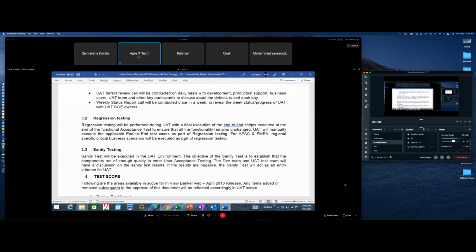Or we can do a certain percentage. What percentage will that be? According to the time remaining, it will be a third of them, right? But you need to identify which 2,000 test cases out of the 6,000 are most critical for your application.